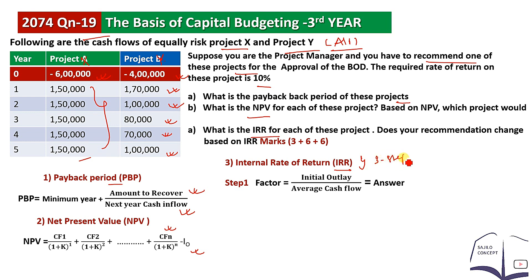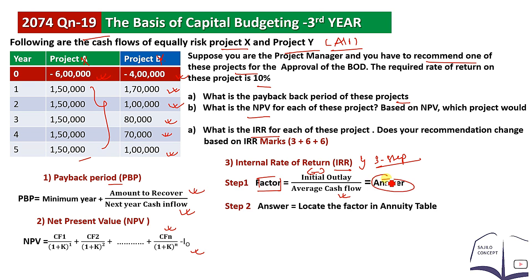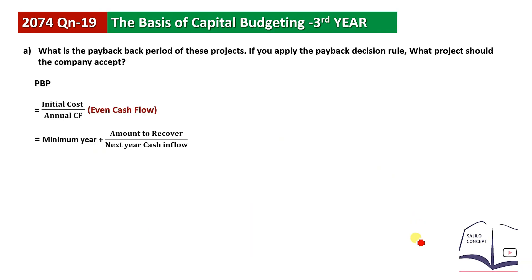For the internal rate of return, we follow three steps. First, calculate the average cash inflow. Second, check the PVIFA table. Third, identify the higher rate and lower rate percentages, then use interpolation: IRR equals lower rate plus NPV at lower rate divided by (NPV at lower rate minus NPV at higher rate), multiplied by (higher rate percentage minus lower rate percentage).